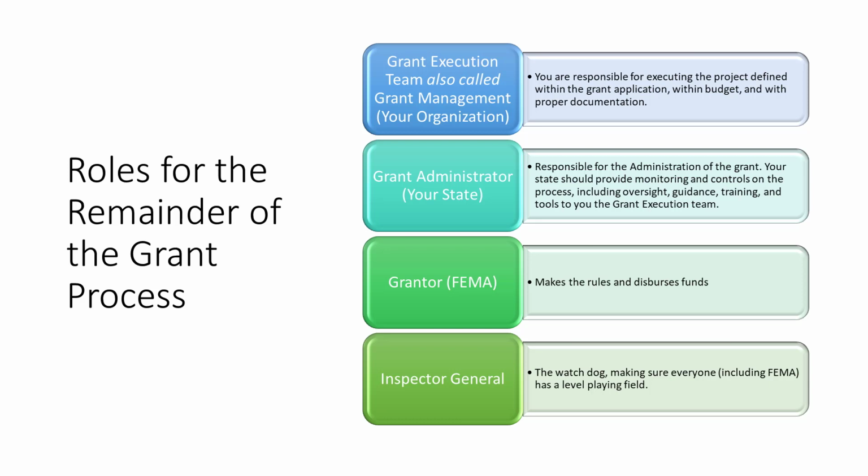The party of the second part, that's your state. Your state is responsible for the administration of this grant. It is their job to provide monitoring and controls on the process. It is their job to provide oversight, guidance, training, and tools to you, the grant execution team. You will submit requests to state administrators, and they will respond. Their response time is defined in policy. And what do you request of them? You may request an extension of time, or request reimbursement, or you may request an appeal, or you may request additional funds.